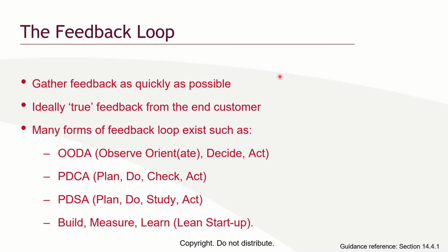There are many forms of feedback loop. Feedback loop. What's a feedback loop? A feedback loop is a way by which you get a feedback at the time you have completed, for example, ground floor. The feedback you get, you use it in completing the first floor. When you complete the first floor, you get another feedback. The feedback will also be used in the next iteration or the next sprint. So feedback loop is taking feedback and using it in the next phase of work.